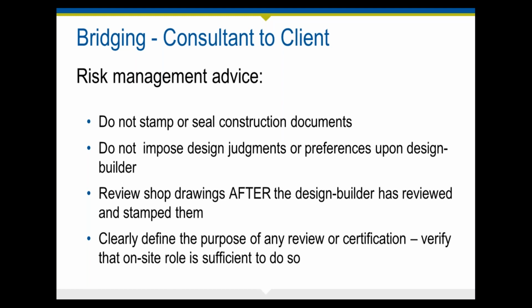If you will be required to review or certify construction, it is critical that the nature and purpose of the review or certification be clearly defined and that the independent design professional satisfy himself that his on-site role is sufficient to enable him to certify as to what certain construction conditions are like.